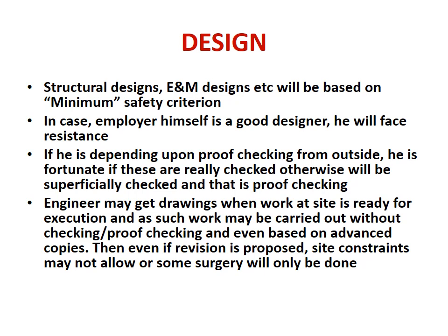The engineer may get drawings when work at site is ready for execution, and as such work may be carried out without checking or proof checking even, and even based on advance copies. This advance copy concept is sometimes in use at the site, and the work is carried out as per advance copies. When a revision is proposed, the site constraints will not allow it, so the EPC contractor will do some surgery, and that work will have to be accepted because it cannot be dismantled, as the work might have been done to an advanced stage.